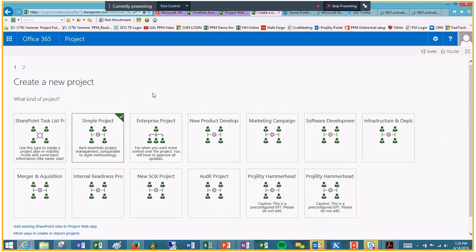And what it's going to do, it's going to offer us up what we call project types. What are the different types of requests we can get into the organization. This is great if we want to separate out or bifurcate different requests that may get routed to different groups for approval, or maybe we have different sizing requirements. So maybe an infrastructure project request looks very different from an SDLC, from an Agile, from an audit, from a Sarbanes-Oxley. Think of it as really the library of all the different project requests we may get into the organization.